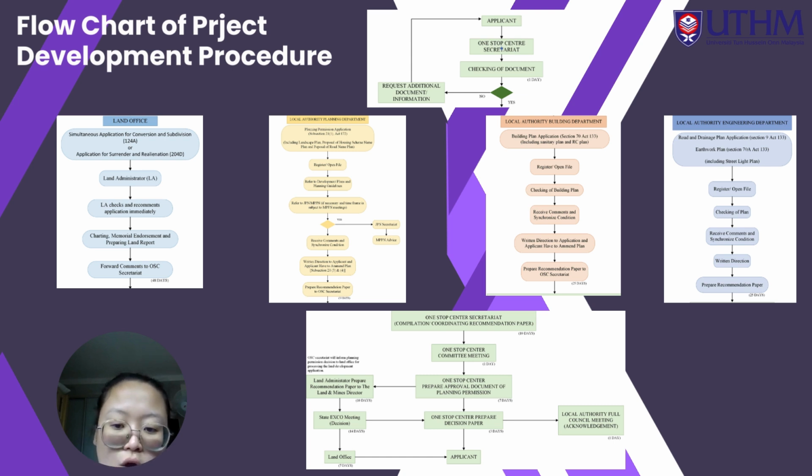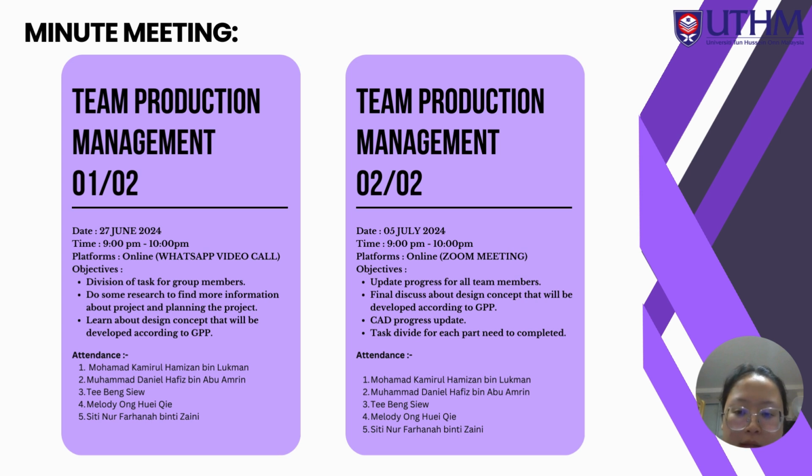The OSC consolidates all the approvals and clearances from the various departments and finalizes the entire project documentation. The OSC coordinates the final inspection and review by addressing any last-minute issues. Once everything is in order, the OSC issues the CCC signifying that the project is complete and meets all necessary regulations.